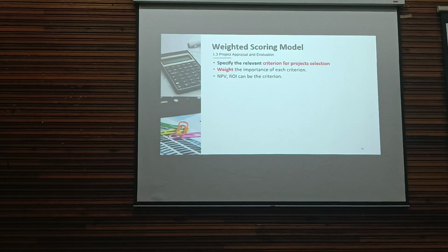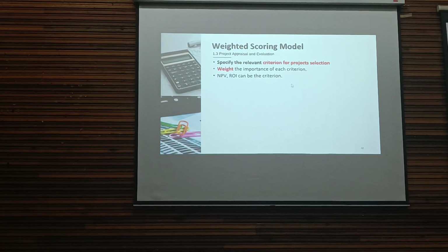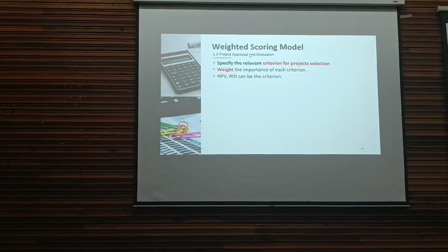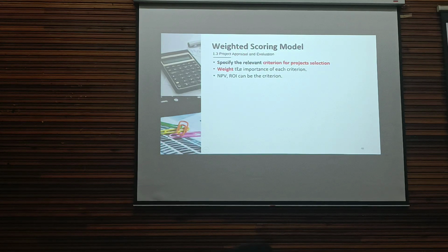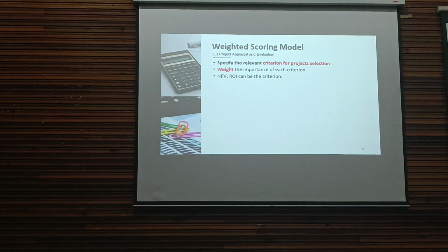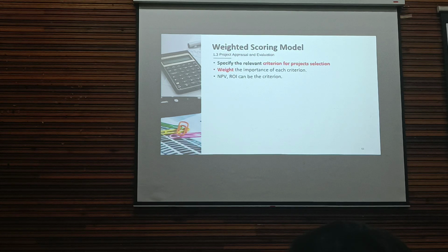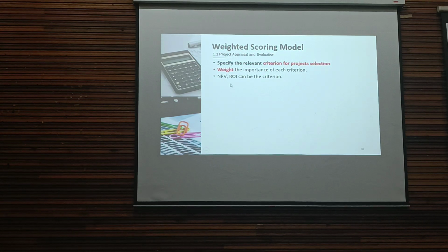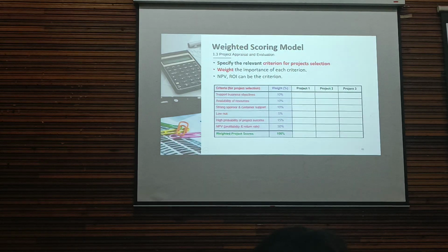This is a non-financial technique for choosing projects. The non-financial technique is called the weighted scoring model. Using this technique, you specify the relevant criteria for project selection. Then you weight the importance of each criterion. NPV and ROI can be criteria.